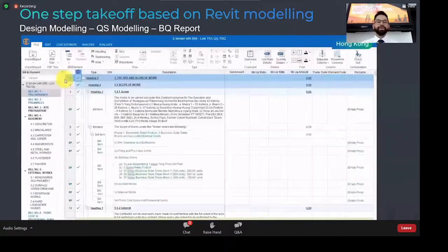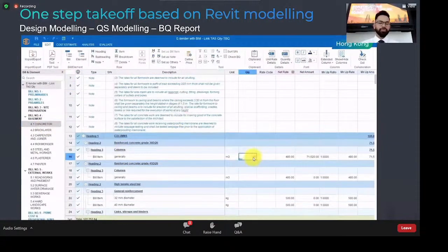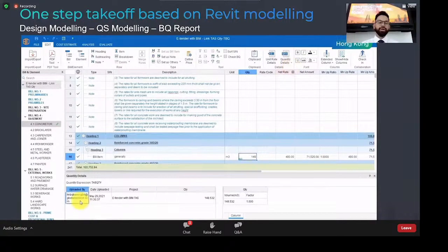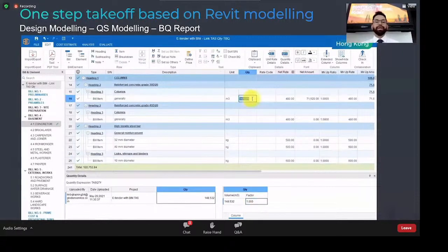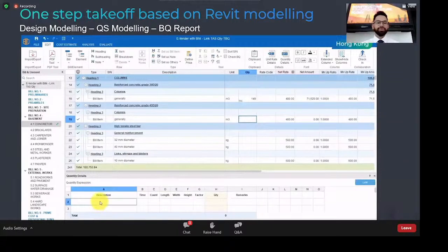So now that we have the quantities fed into the BOQ, if we switch to our estimation software TBQ and see the quantities over there with the details, we can see which QS attached that quantity to that bill item and at what time, with every kind of detail. It also shows with a sign that the quantities came from the task software, which is Takeoff Architecture and Structure.